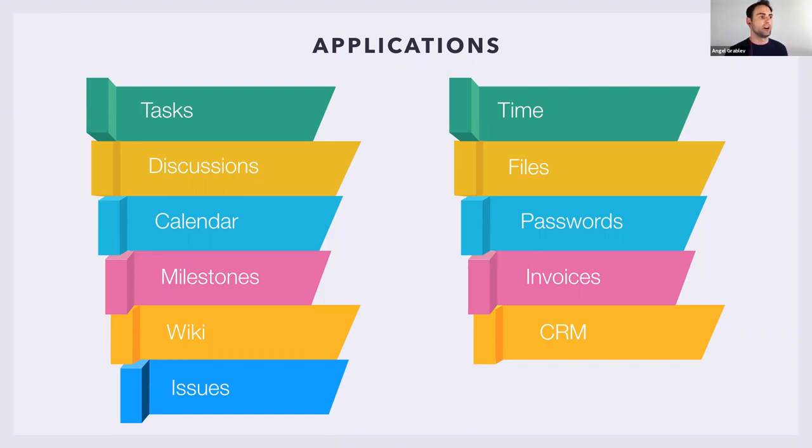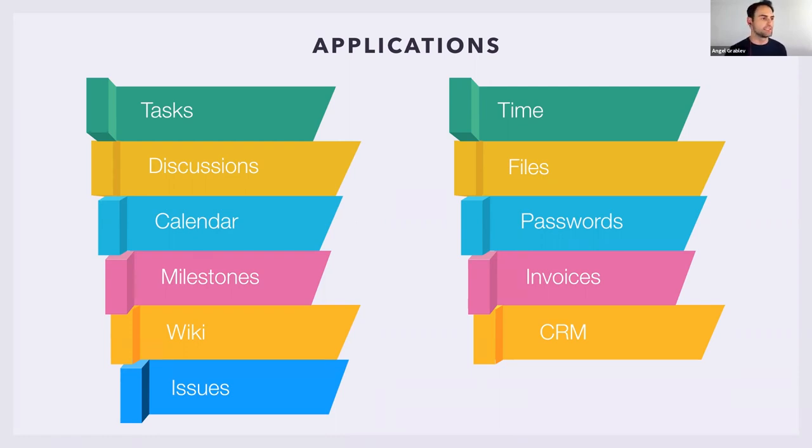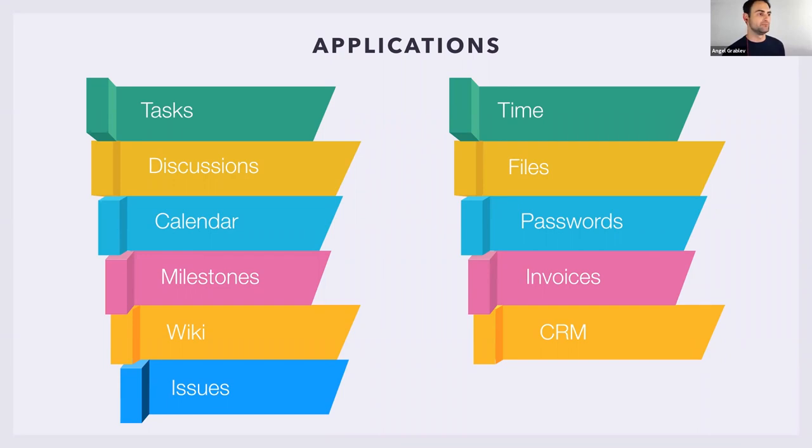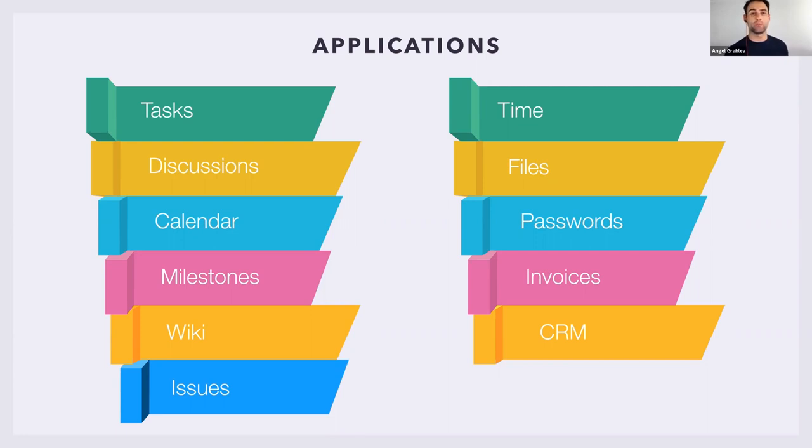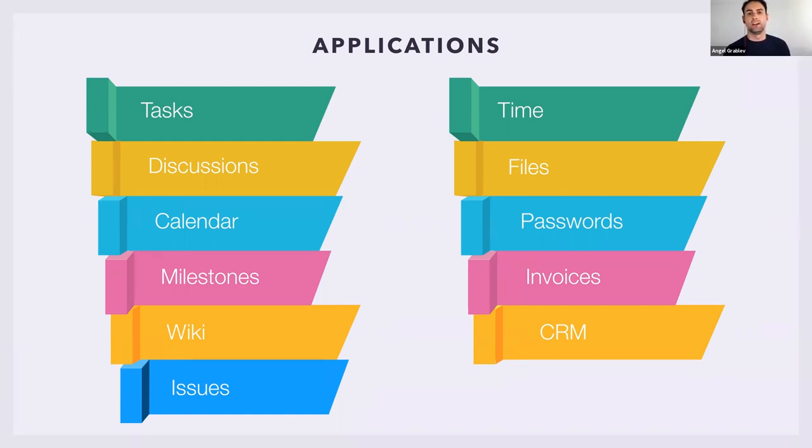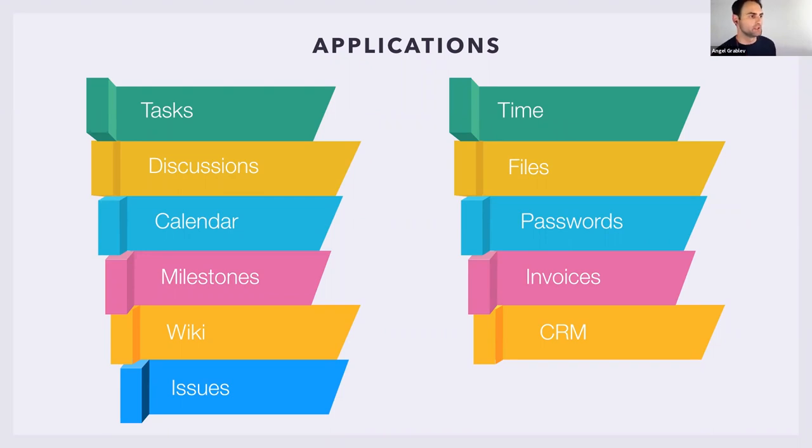Then we have our calendar, which as I said, is a fantastic tool that shows you all the different items with due dates and start dates in one place. Integrates with Google sync. We have milestones, which we just upgraded to be very useful. You can associate tasks from any task list into a milestone. It will show you progress. It lets you basically create tasks within the milestones application. Very flexible. It's a great way to manage sprints. If you do what we do, which is have a task list for each type of team, design, engineering, et cetera. When we create a sprint, that way we can have it all in one place and track progress report on how much percent has been completed.